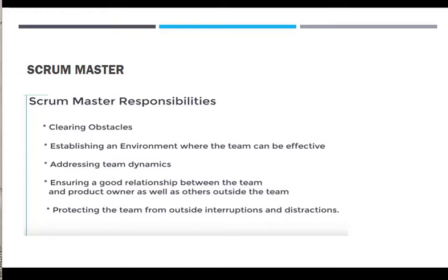And the Scrum Master understands how Scrum is going on, how the events are needed. Very good responsibility of the Scrum Master. And here are also Scrum's events. The Scrum framework consists of 4 events within a time box, with a time bound, such that every event has a maximum duration. Once the sprint begins, its duration is fixed and can neither be shortened nor extended under any circumstances.